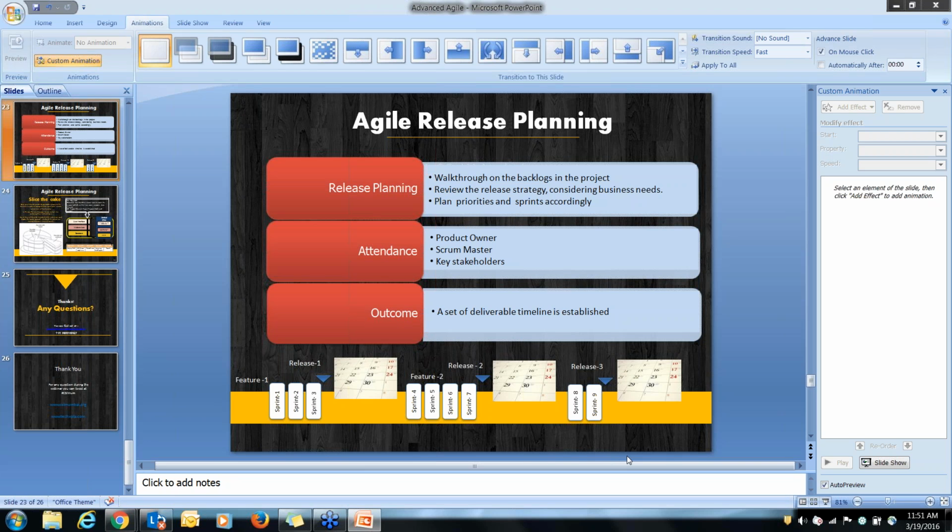So they could have highlighted it to the product owner, and when the team was working on the task, they could have consulted the product owner and decided, okay, we can remove this particular piece of work from the requirement, and we can deliver this whole sprint and just stick to the timelines. So this could have been one of the cases.